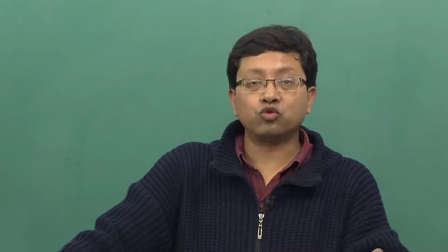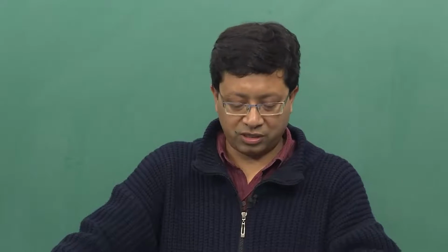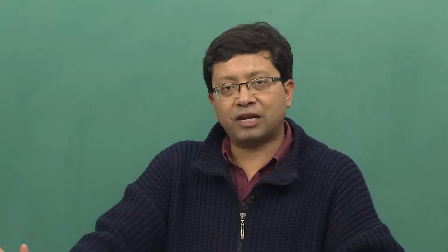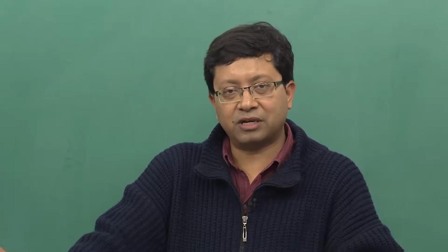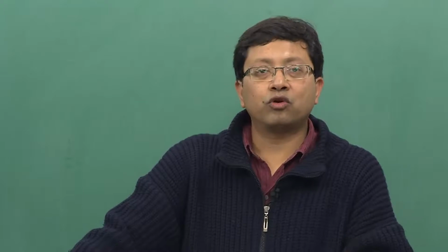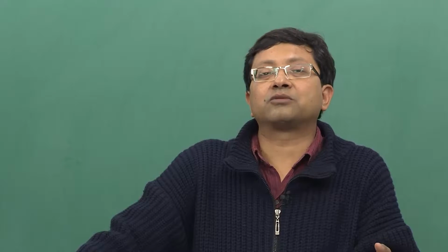So, this can be used to answer several important questions. One is: what is the probability that the project will finish within a given deadline? Why is it necessary? Because in many contracts, projects and sets of activities, there would be a deadline such that the contractor would be penalized if the deadline is exceeded, but on the other hand the contractor would get a benefit if the work is finished before the deadline. So, obviously, you have to have a cost-benefit analysis based on whether the deadline is exceeded or not.